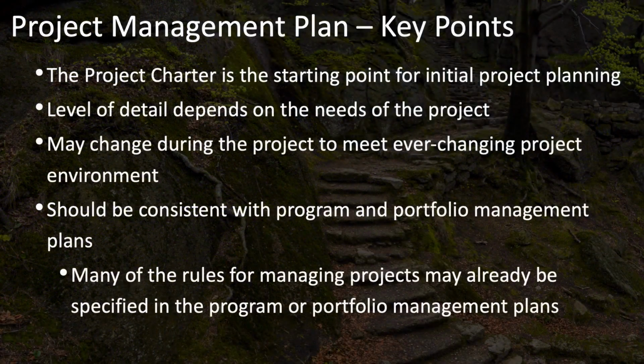Here are some key points to remember when it comes to putting together the project management plan. First of all, the project charter is the main key document that is used to start off the project management plan. It already has a high-level description of the project across many different aspects and attributes, and those should serve as the starting point for the development of the project management plan. Also keep in mind that the level of detail that's needed in the project management plan depends on the needs of the project. It could be very detailed or simply summary level.